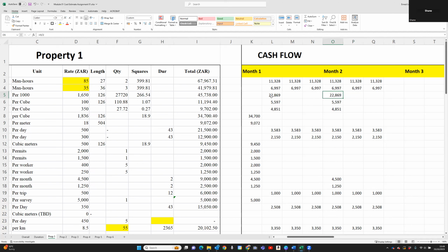So it's going to take the guys obviously 3 weeks to build those and 3 weeks to build those, okay? And if they build 1,000 bricks per day, then with 2 guys, that should be pretty quick. But they're not going to build 1,000 bricks a day. They're probably going to build between 500 and 600, okay? It also depends where you are and what the situation is on the ground.